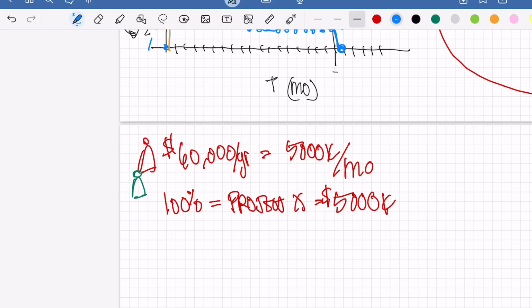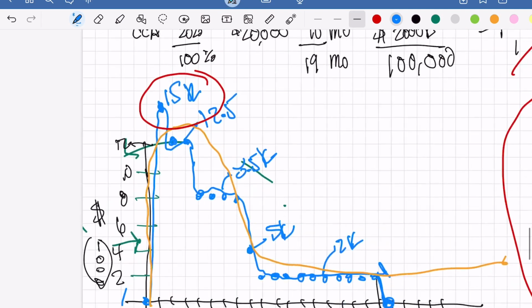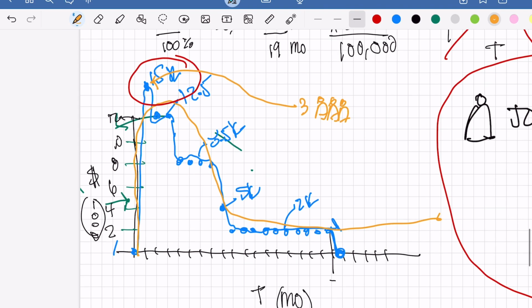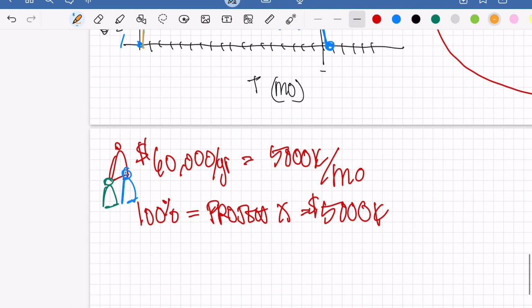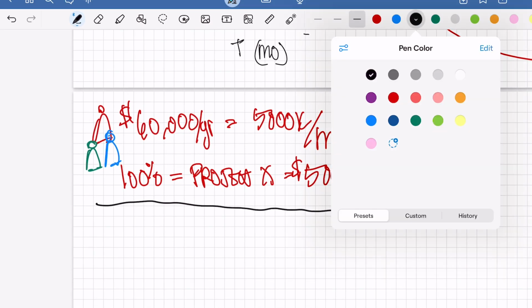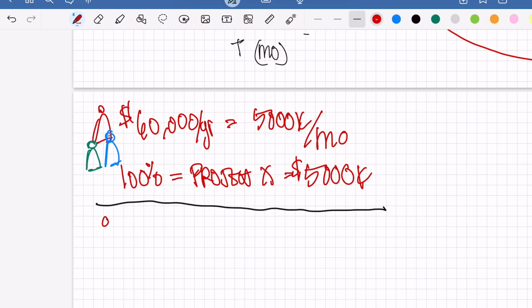You find a few more friends for Joe. And assuming they had the same amount of salary that Joe did, we actually have to have 3 people staffing this. So that's the first big issue that you have to realize. $15,000, 3 people, okay? 3 people. I'll draw these little people. I love those people. All right. But then the second 2 months, it's 12.5. Well, 12.5 doesn't seem like a problem, except we have staff that's $5,000 a month. So now we have Joe.